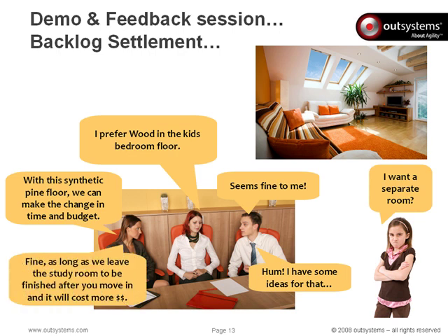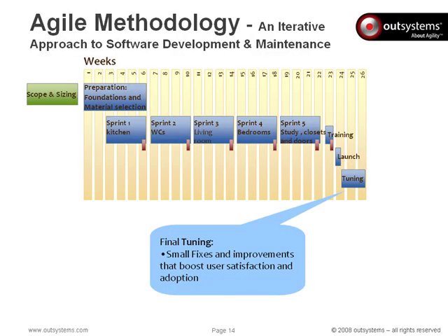To everyone's satisfaction, the chief architect came up with a new strategy. She was going to incorporate the bedroom changes as long as we were willing to leave the study room to be finished in a second phase to avoid compromising current budget and timeline. This seemed quite reasonable to us, given that we needed the house in time while keeping our family budget balanced.